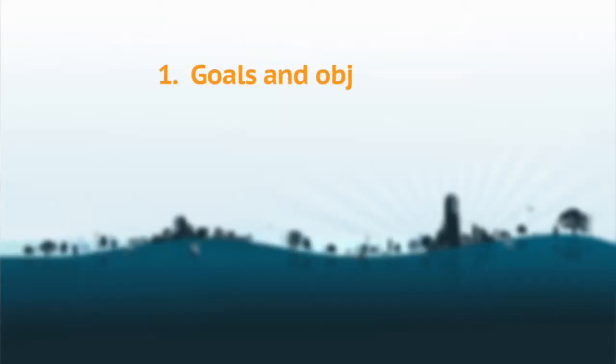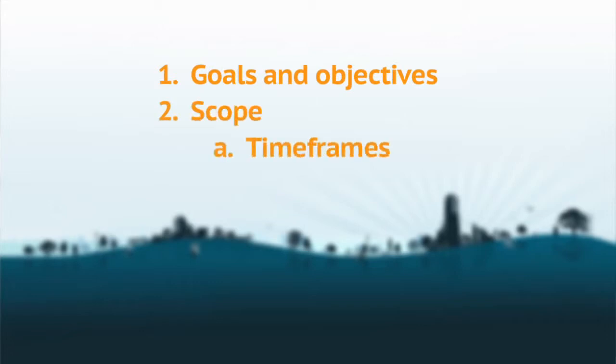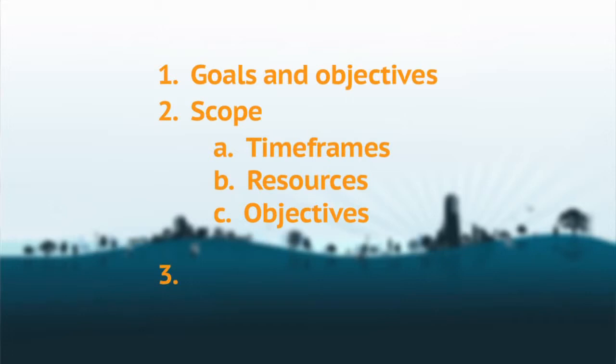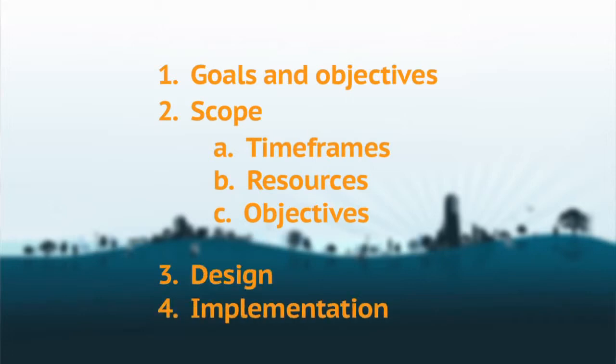Always start planning your project with your goal in mind. After considering your goal, consider the scope. Consider timeframes, how long you want it to take. Consider resources, how much time and money you have, and how to spend it. And consider your goals and objectives, what you are trying to achieve. Only after you've gone through the goal and scope definition stages can you go into the design and implementation stages.